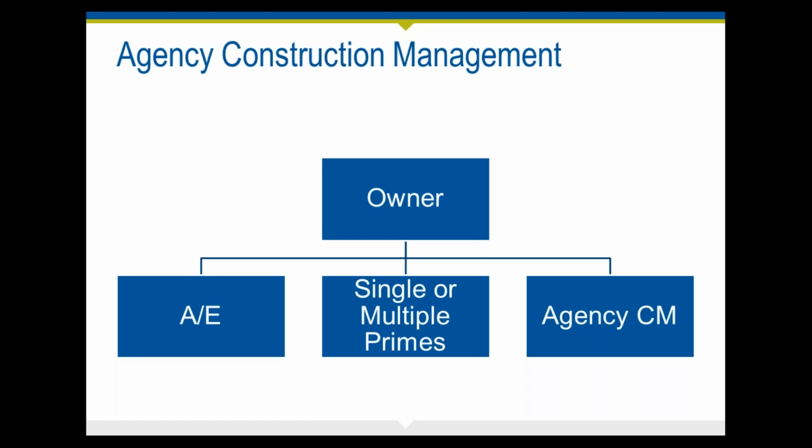There's still an independent design professional, an AE, who's providing design services, but as an agency construction manager, you are acting as a representative and agent of the client. And typically, that's the project owner. And you're commonly known as the agency construction manager. This can be provided by a design professional or a contractor. And typically, you're providing services under a direct agreement with the client, and you're independent of both the design professional and the general contractor or separate trade contractors that the owner engages with.